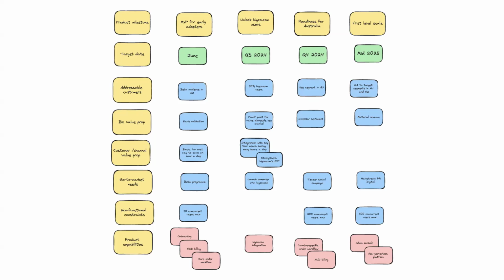So if we've got customer A, B, C, D, what order do they go in? What order would you not want them to go in? Is customer C, if we delivered them and nothing else, would that be bad? What about customer A? What about customer B? So you kind of whistle your way down to, if the business was in trouble and we could only deliver to one customer, which customer would it be? And then you just keep doing that process. And that's basically how you end up with a set of milestones.